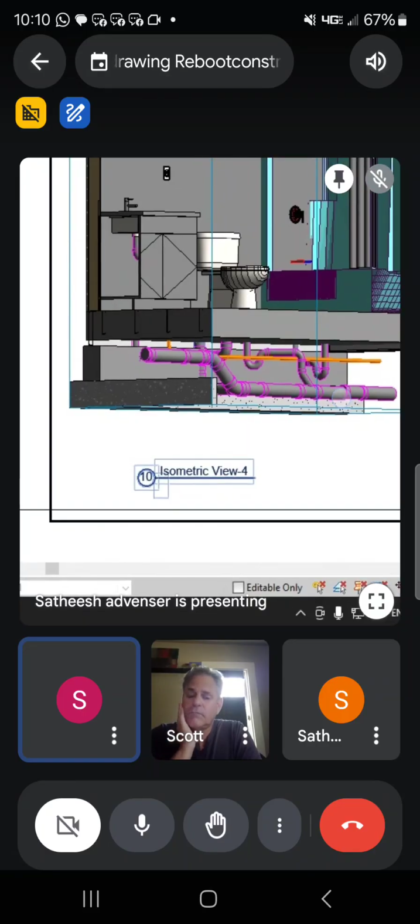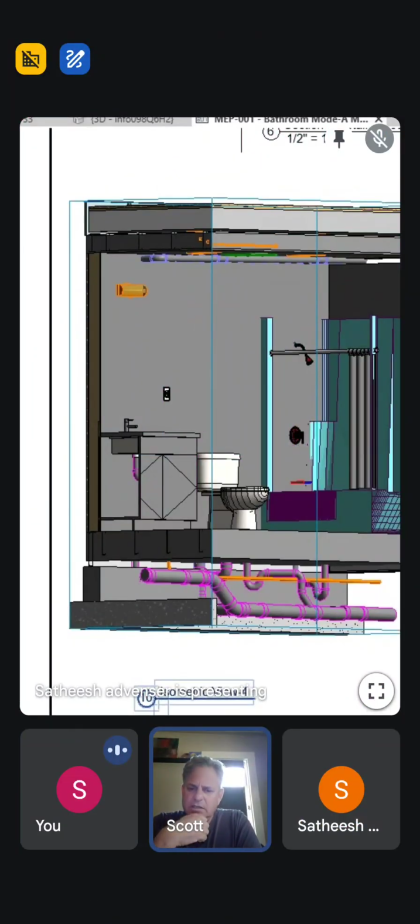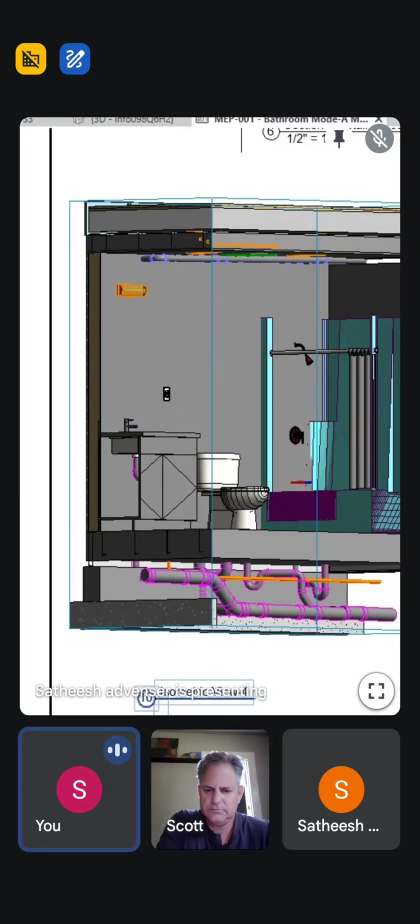Correct. Yeah. Well, like on the plumbing, it's going to be a little bit tricky. You're going to have to supply them like with the kit, that main portion of the tree on isometric view 4, that portion of a tree needs to be already assembled. You know what I mean? And glued together. Yep. And where they're just gluing big chunks of it together, like straight runs together. Yeah. And depending if we send them a superstructure, they don't even need to deal with that because that superstructure, the whole box will already be stamped and sealed by Intertech. Right. Right.